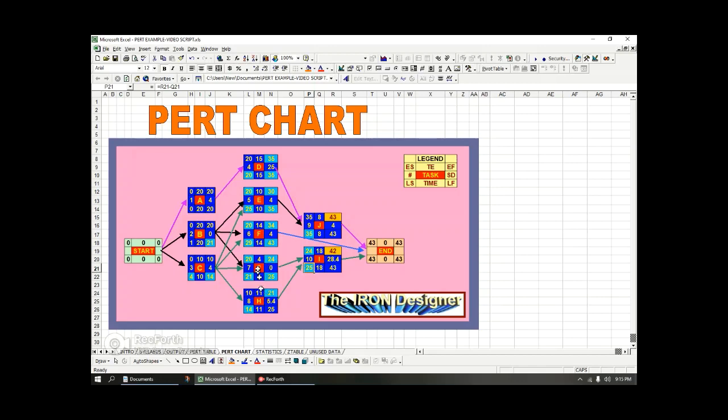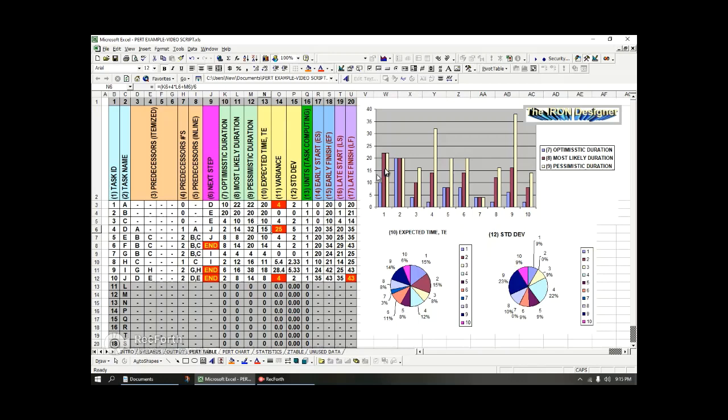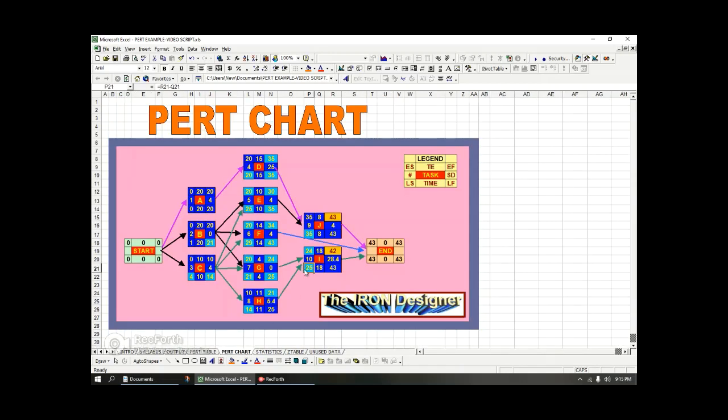So since you see the two arrows, these are the two predecessors of I, just like we have in our Pert table. So I has G, H. So you go back to the Pert chart. So we're looking at 25. We put 25 in each of the LFs, okay? And we subtract their TEs. We get here a 21 and a 14, okay?